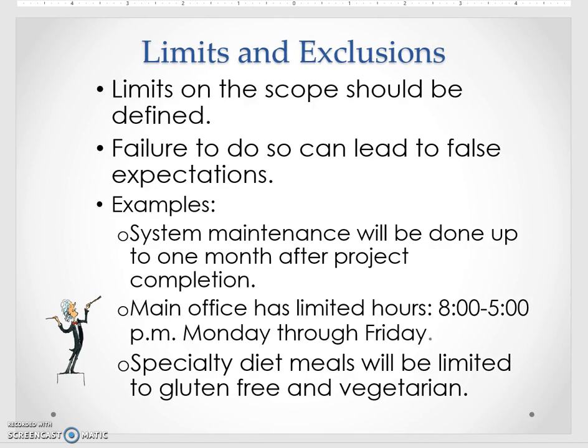Then there's the limits and exclusions, and these are just a short list of things that you want known that you are limited by or you're excluding. So limited might be our scope is limited to installing software on 25 computers.